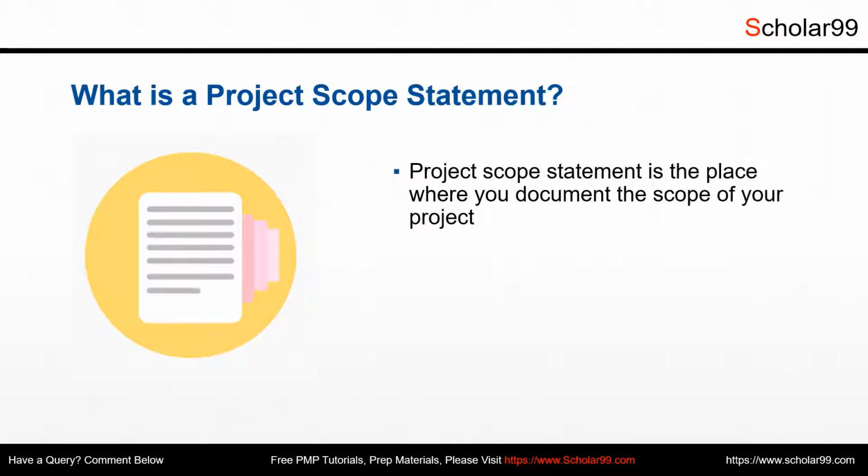Usually, the project scope is developed in an iterative manner. For instance, if your project has 4 or 5 iterations, then a high-level vision statement for the entire project is first developed to provide a big picture to the stakeholders. However, a detailed project scope statement will be developed for each iteration separately. Project scope is typically developed in a joint application design workshop. A joint application design workshop will have a moderator who is usually not part of the project. The moderator will organize the workshops with clear and unbiased agenda with help of project manager and other stakeholders.